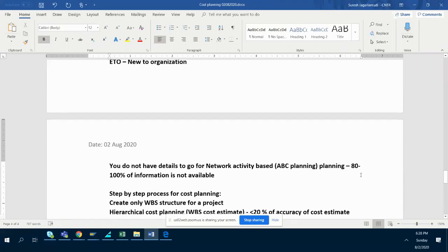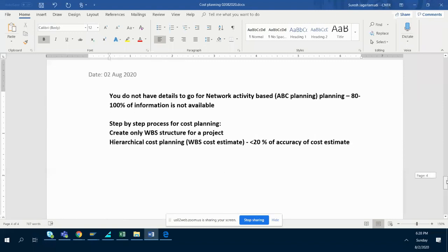Okay, so in any planning we are using, we should understand what the accuracy level is. So it is phase one. That means in phase one you only have 20% accuracy. That means you are only discussing with someone, asking for a quotation or information from someone. One of my friends has already executed a 25 storey building. I go and sit with him and ask him for a cost estimate, how it is going to be. Then he will explain high-end WBS elements.